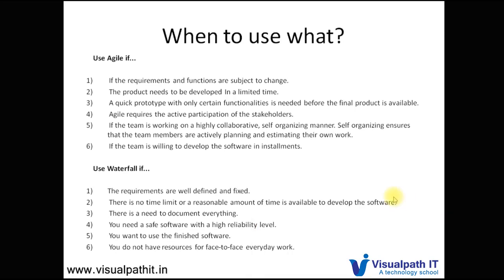On the other hand, we can use waterfall when the requirements are well defined and fixed, and we are not expecting any changes in the requirements, and we need more documentation, and you need software which has gone through all the phases, with all the documentation in place, and a highly planned one.